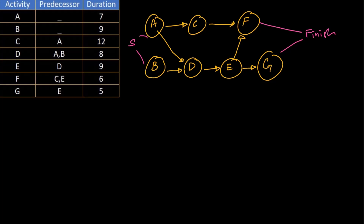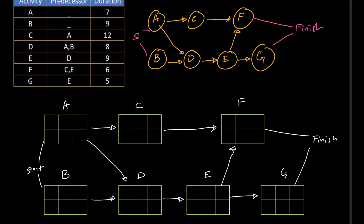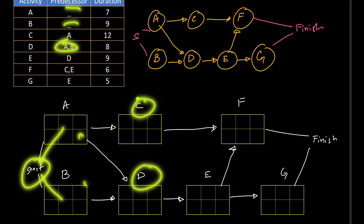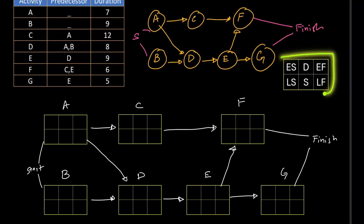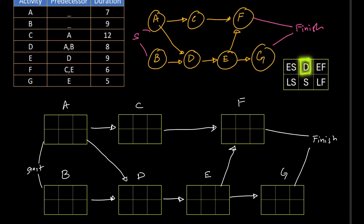Now we need to make a detailed box diagram. We have labeled the CPM box diagram and copied the structure to a detailed version where the boxes are not filled yet. The project starts simultaneously with A and B, both having no predecessors. D starts after finishing A and B; C starts after the completion of A. The format for labeling the box: duration on the upper middle, slack on the lower middle, early start, early finish, late start, and late finish. The easiest step is to label the durations — A has a duration of 7, B has a duration of 9.